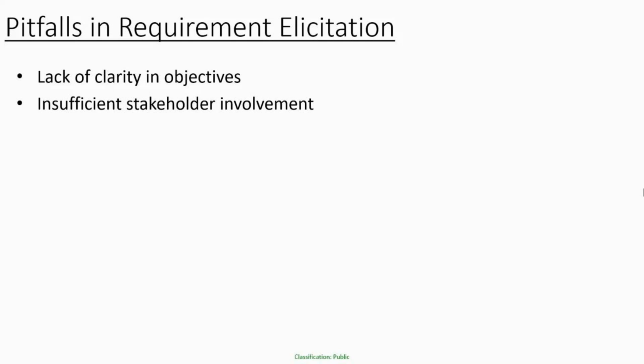Okay, how do you do that? Do not raise a concern after the entire requirements gathering sessions have got over. That may not help. So initially itself, when a couple of sessions have happened, a couple of workshops have taken place, and you find that a specific stakeholder is not available, raise this concern with your project manager, and there'll be a specific person assigned as project sponsor from the client side. Let that person be aware of this point. It's not like you're escalating something, but rather you're raising a concern.